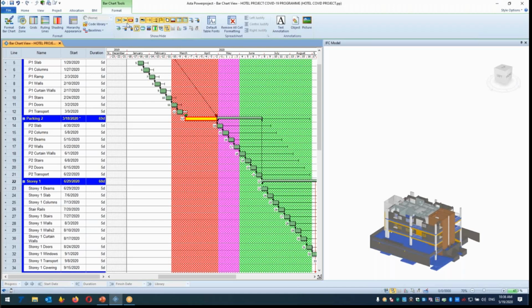In this case, I would suggest to analyze the negative float and list who are the highest negative float activities. You just need to rebuild your schedule for the remaining time after COVID.